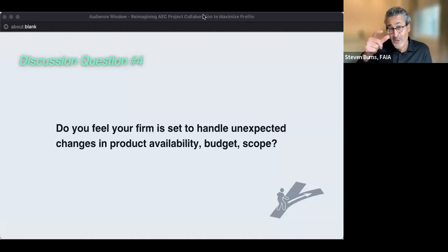So if you'll give me just a moment, this is what I know. I know when lucky, a firm is going to actually create a bona fide project budget. In most cases, it's not going to be very detailed. I'll see a set number of hours and a number of dollars that they're going to allocate for every phase of their project. And then after that, they leave it to the PM to decide how they're going to spend that time and money. But if a firm doesn't have a work breakdown structure, the WBS, meaning a plan for how they're going to eat the proverbial elephant, one bite at a time,